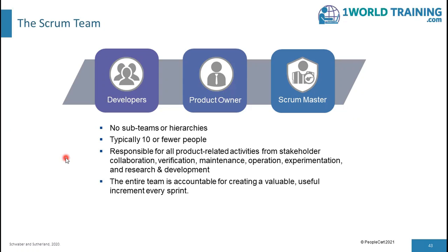Working in sprints or short iterations at a sustainable pace improves the Scrum team's focus and consistency. Sustainable means the pace should be sustained, meaning the team should be able to commit the work and able to finish off or deliver the committed work in each sprint. And they should be able to sustain it rather than taking up too much load and not able to deliver as committed. That would be unsustainable because they would have to put in extra hours if they are lagging behind. And that can lead to burnouts.